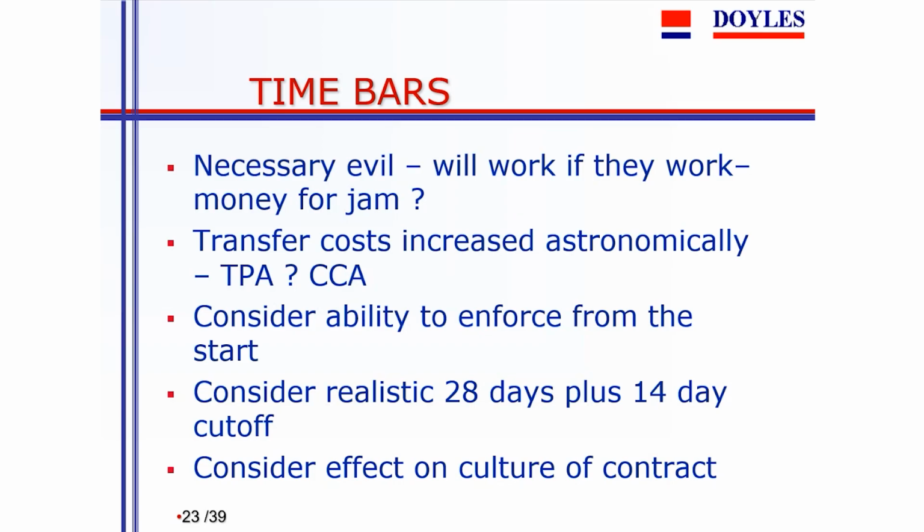So it's very important to be alert to the time bars that apply. And when one's looking at a contract, one should identify each time bar and make sure that that's clear to any contract administrator in order that they don't mess up.